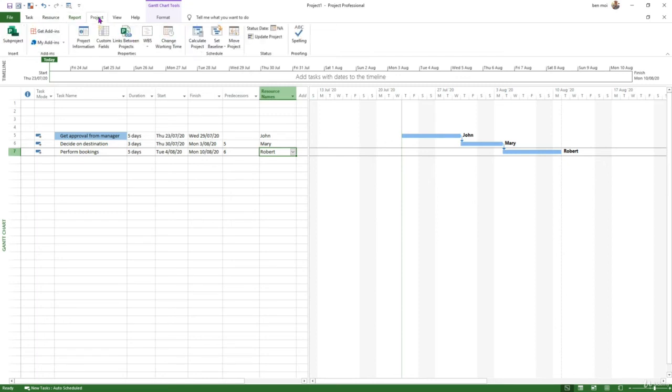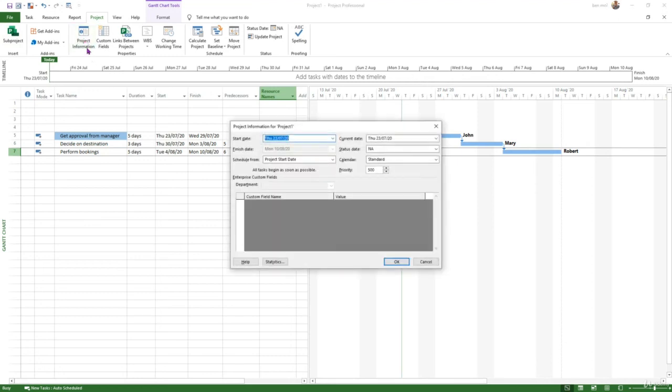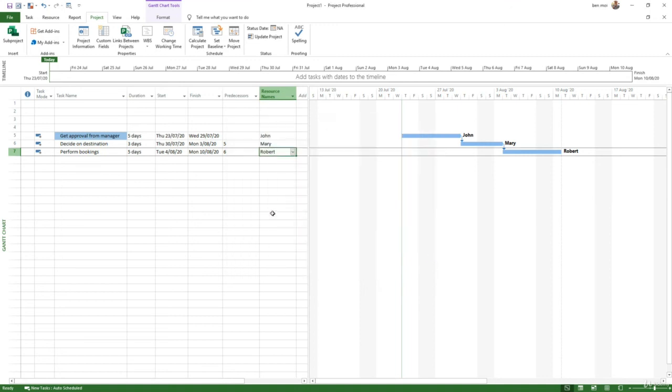There's one called Project. We'll see that the sub-project is not something I recommend. So if you focus just on the key ones, Project Information, that's where you can put some key data about the project. You can select, we'll see what the calendar is, but where you can select the start date. So I suppose it's good practice to input the start date here. So it will shift all the tasks after the start date if the start date is in the future. But that's not absolutely critical.